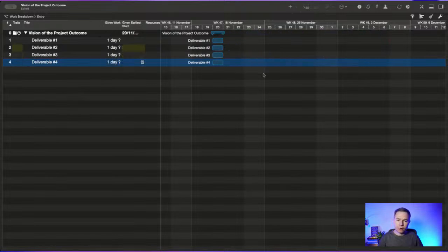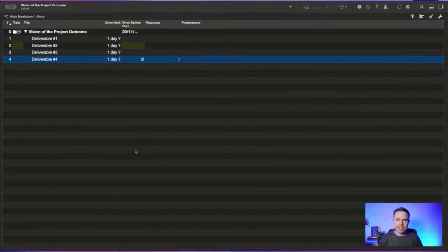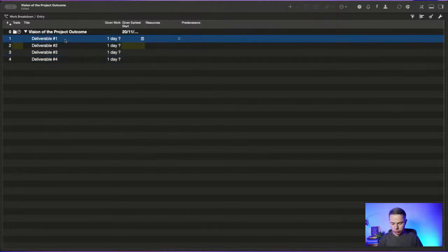So if I were a developer of this application or any other application, I would say you should not see the Gantt chart section until you click a specific button that says, I have identified all major deliverables. Only after that would I give you permission to look at the Gantt chart. So if you are ever using this kind of tool, maybe it's MS Project, it doesn't matter, you should first focus your full attention on identifying deliverables and breaking them down into work packages.